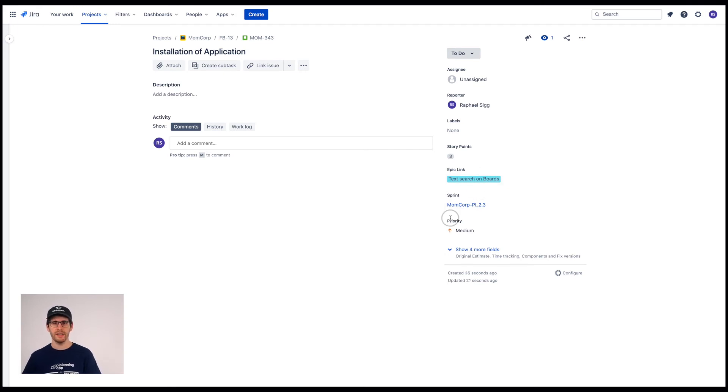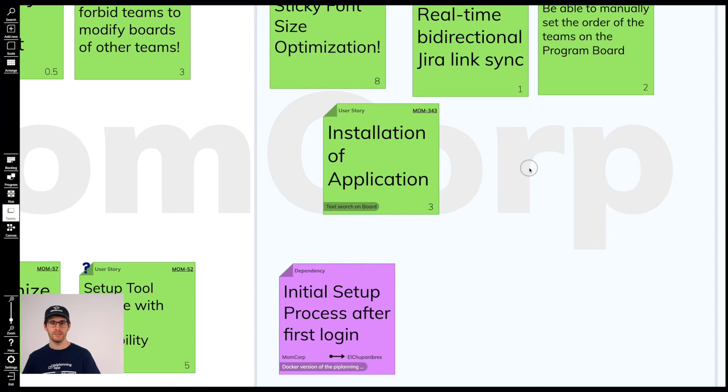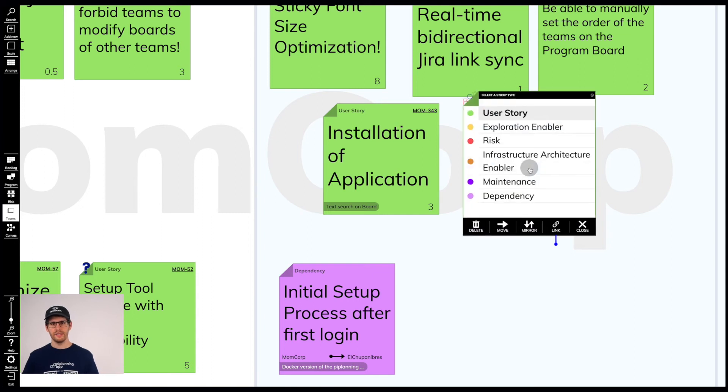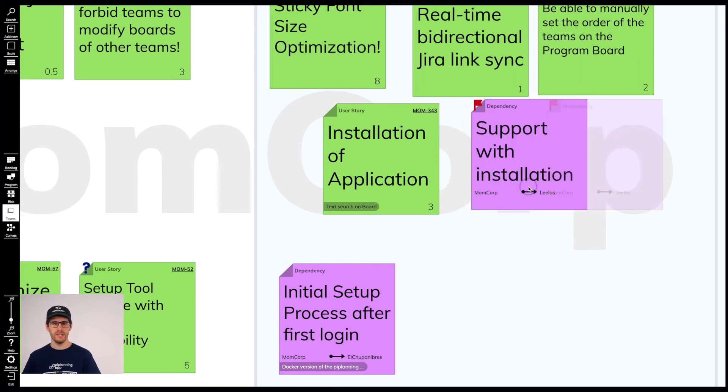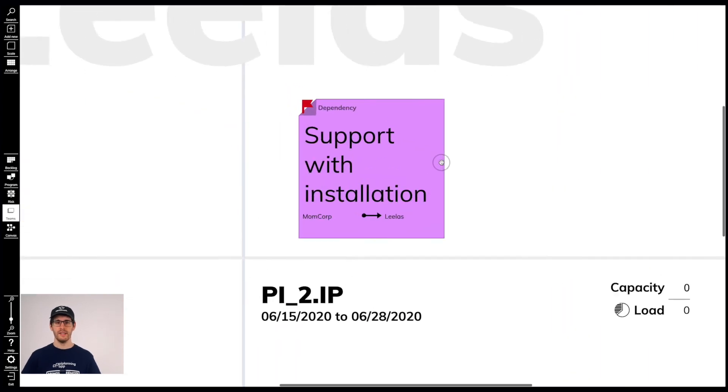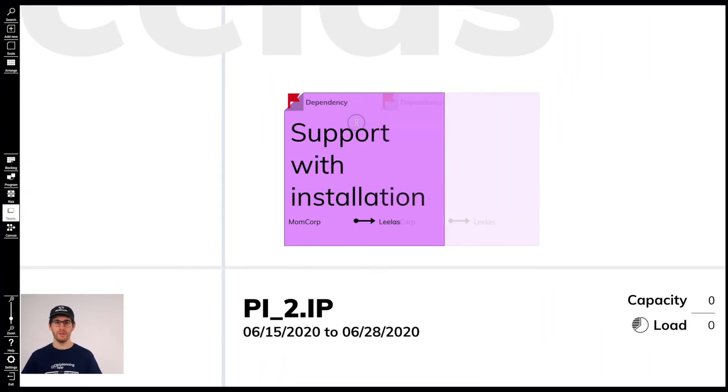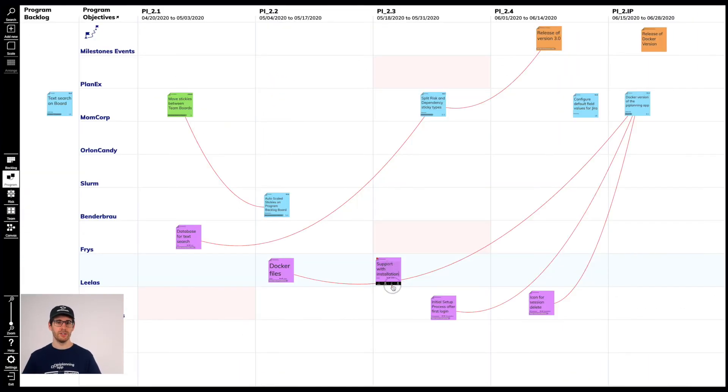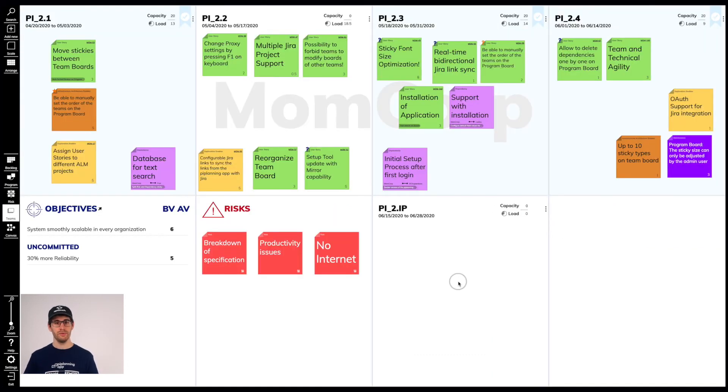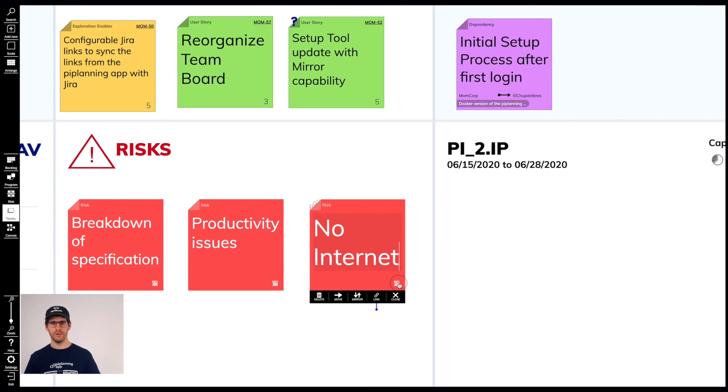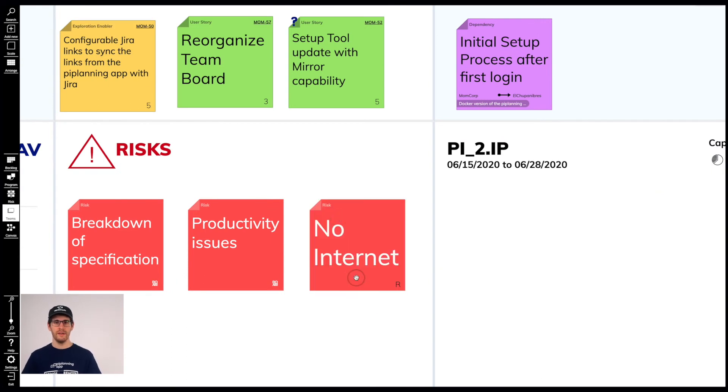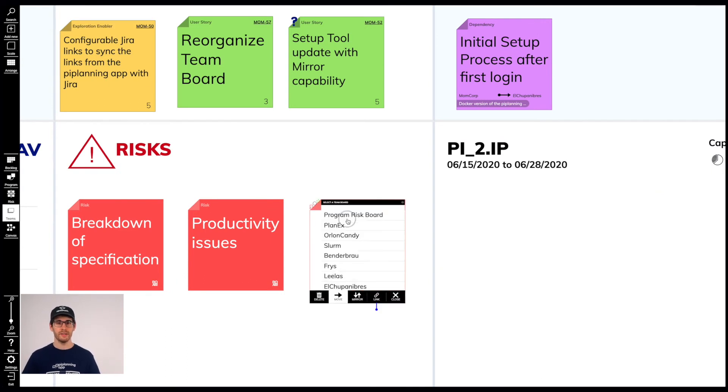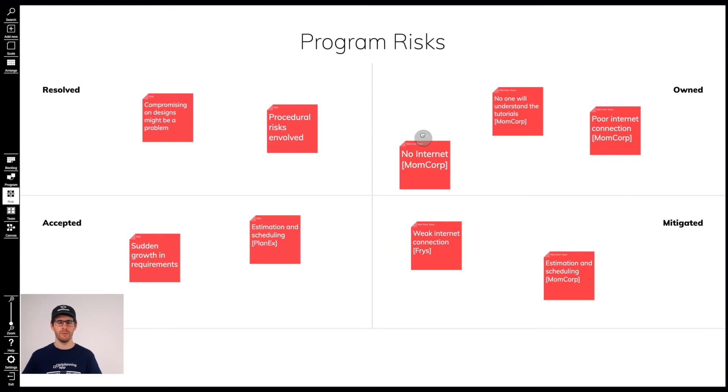After that, I would go into the following procedures on how to handle dependencies between teams. One team creates a dependency sticky and sends it to the other team. The other team plans it and sends it to the Program Board in order to visualize the dependency. All 100% transparent. Then, what to do with the risks, roam them on the team board and at what point in time to send them to the Program Risk Board.